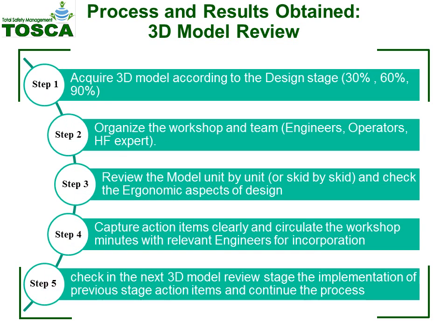In order to perform the basic ergonomic review regarding accessibility and maintainability of equipment, a basic ergonomic review using a 3D model was performed in the case study. The 3D model review took place at 3 different stages of development of the project: 30%, 60% and 90%. A structured methodology was provided explaining the team and members involved, plus a checklist for ergonomic aspects to